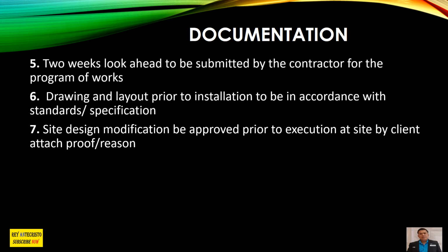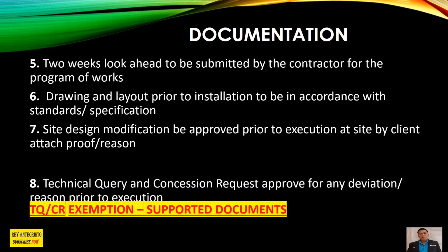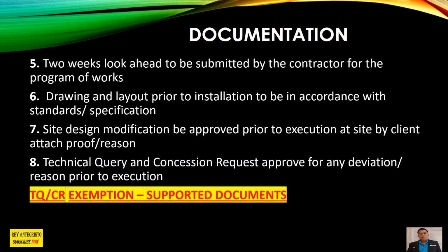When you install, the measurement will always be proactive, because what is important is that commissioning and also maintenance and operation can work easily during their operation and during their maintenance. That's why any modification must be approved by the client. Okay, and number 8, technical query and concession request approved for any deviation reason prior to execution.